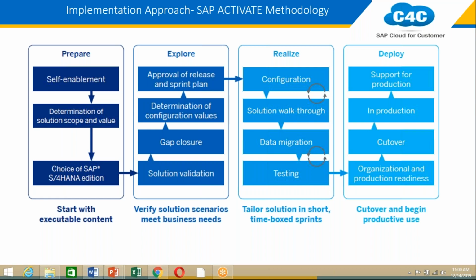Client comes with the changes, and they refer to those changes as business critical changes. Now if we need to take those changes, and if it is business critical, we need to amend it within the time frame, or we can come with a change request with an extended time frame.